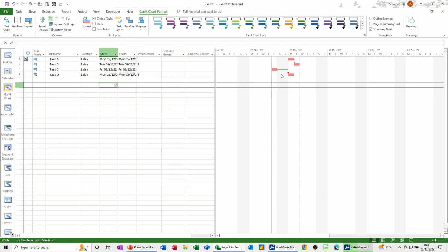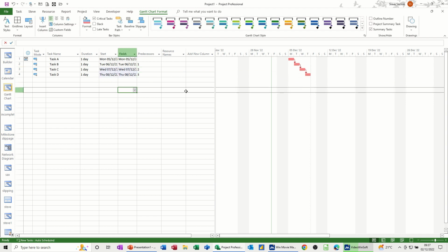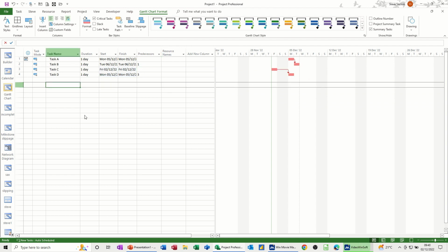Now they both go red, because they are both critical in terms of this little demonstration. However, if I suddenly link all this together by adding a link to task 2, there is only one critical path now because they're all part of the same thing. Take the link out and I get the critical paths again. Another way to show a critical path or force a critical path to be displayed is to use a lag.